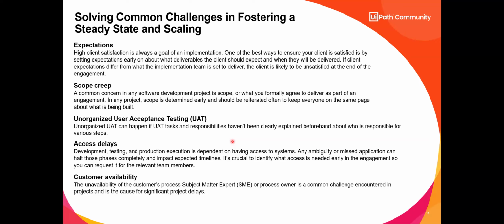So that's why in the kickoff meeting, we bring in the IT team in the kickoff, right? And that's why we show them that priority list and that backlog constantly, so they know what's on the horizon and they're in the initial stages of the project. Now, I'm not talking about the program kickoff meeting. I'm talking about each project within that program should have a kickoff meeting. And in that kickoff meeting, your IT team needs to be in there so they understand readily what you're going to be doing, what it's designed to do, what systems it's going in, and you're going to work with them to facilitate that.